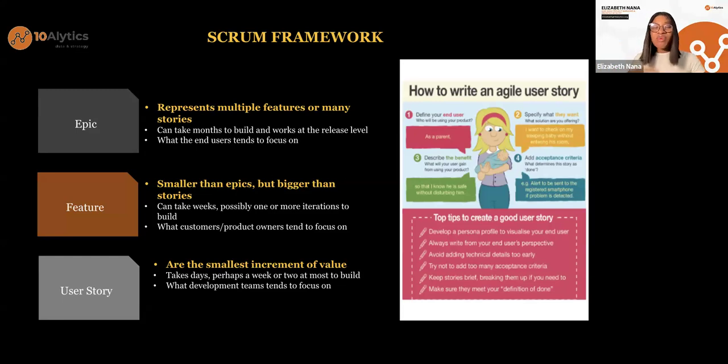That is what an epic is. Now, features are smaller than epics, but they are larger than individual user stories. Features can take weeks, possibly one or more iterations to build. And they are also what customers or product owners tend to focus on.